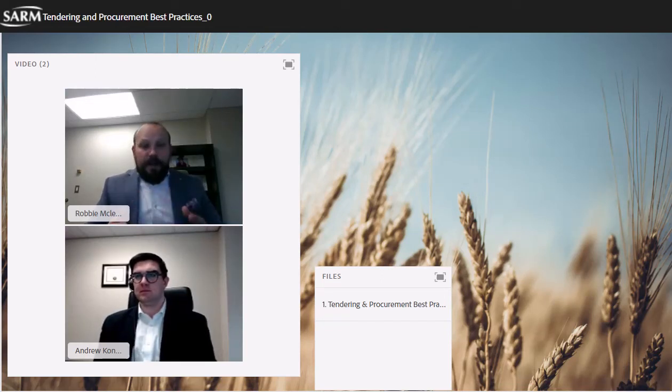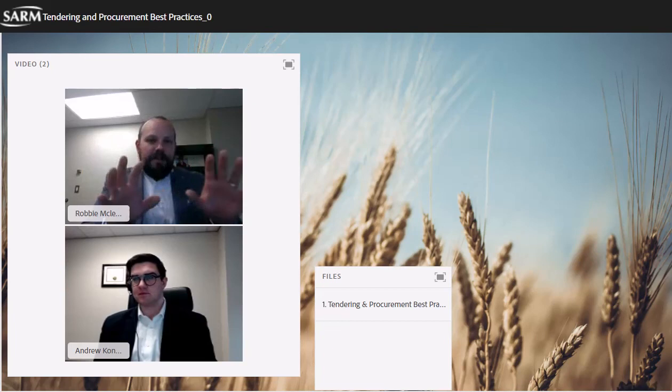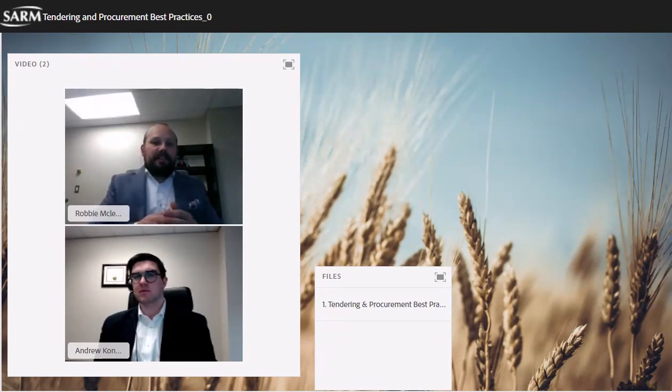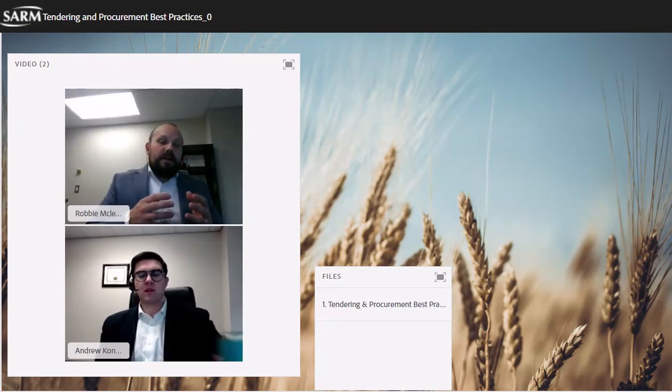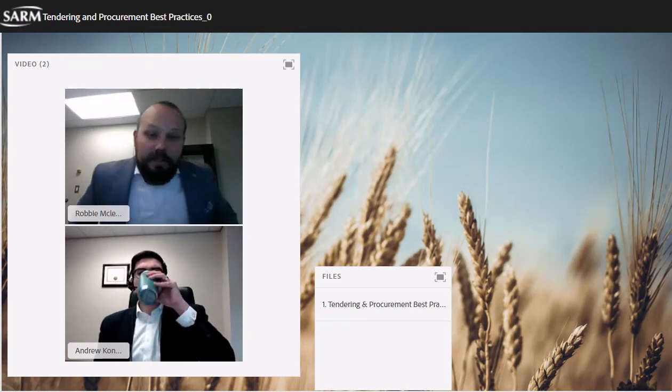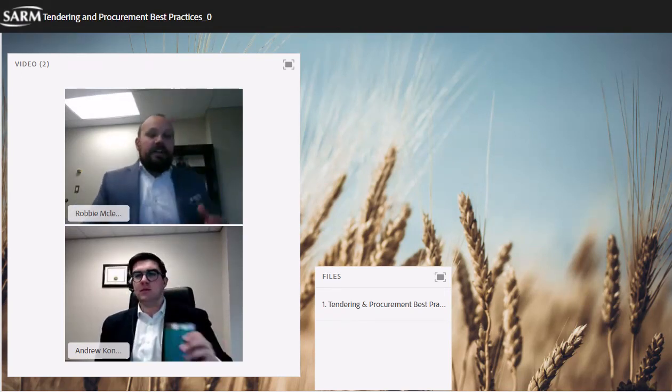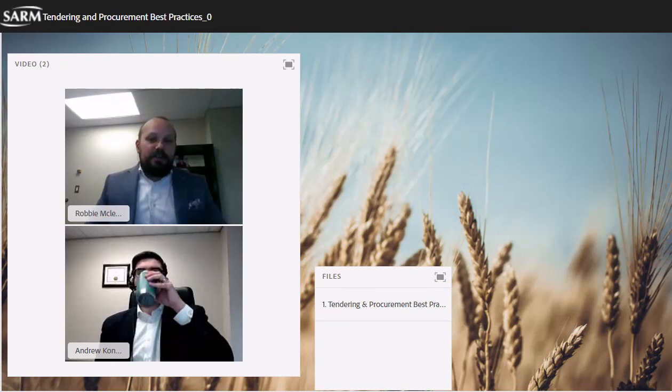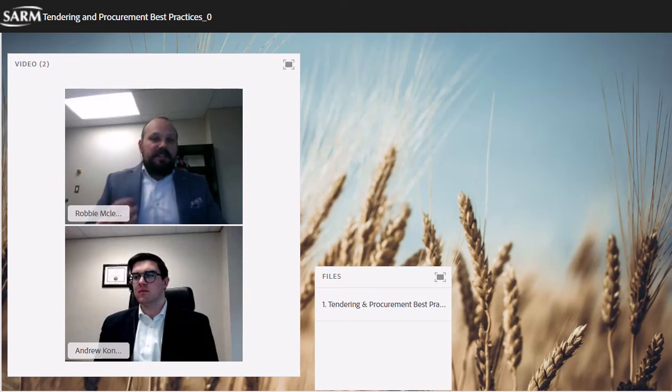Now, if it's a non-binding process and there's some flexibility to allow for some awards based upon qualitative assertion, some flexibility in negotiations, some flexibility in how we award, and we don't necessarily have to award to the lowest bidder, the lowest compliant bidder, and we have what's called a discretionary clause, then we can potentially avoid any type of consequence there, subject to what's in the trade agreements.